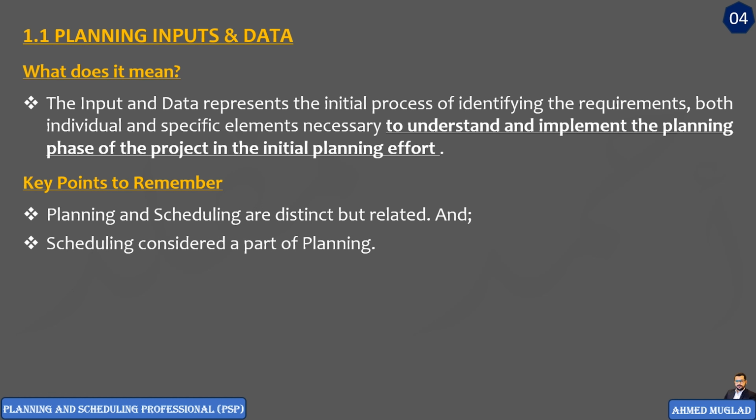The scheduling process is considered a part of the project planning or planning phase. Always remember this one. The scheduling process is considered a part of the planning phase. By the same concept, the schedule or the program is considered a part of the project plan. In the planning process, we develop the project plan, the big one, the comprehensive one. In the scheduling process, we use the project plan to create the project schedule. And then the project schedule represents the combined timing of the project plan.